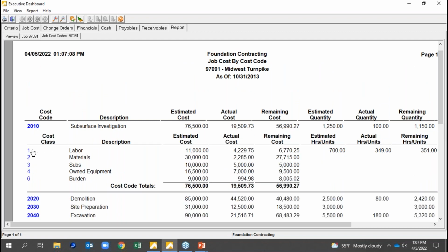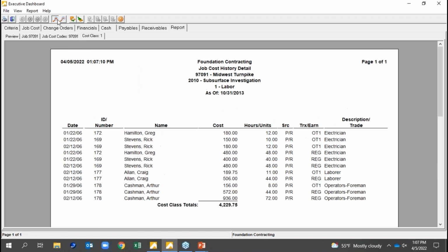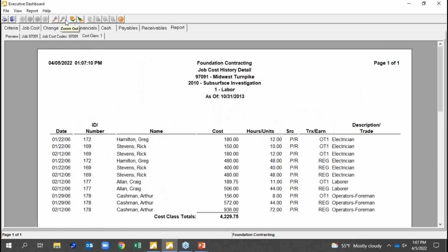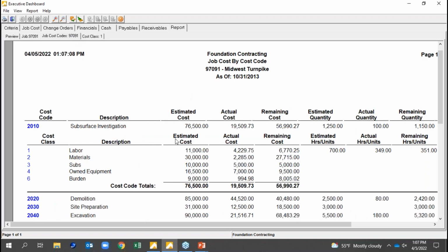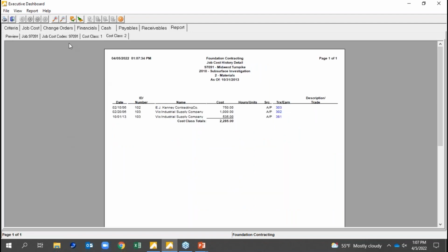As I click into here, if I click into labor, there's that backup detail, right? There's that payroll detail from the payroll module, the time card info. Notice the burden here. We're showing proper burden from that portion of labor. Your share of FICA, FUTA, SUTA, workers' comp, fringes, general liability insurance, not just the wages, but the full real value. So yeah, concept-wise, pretty simple.